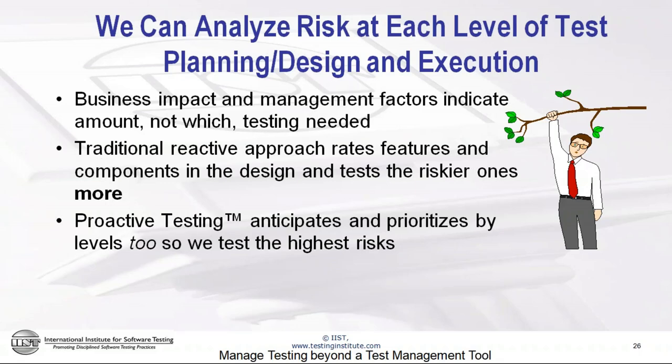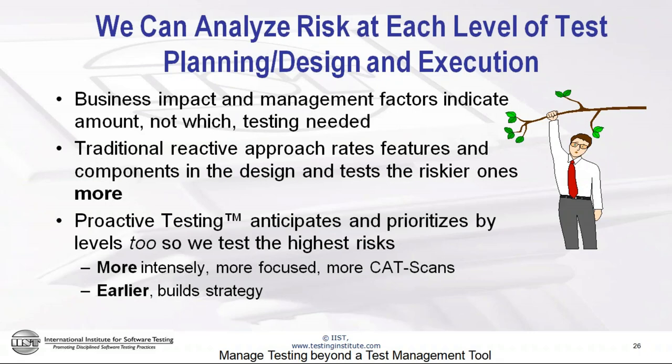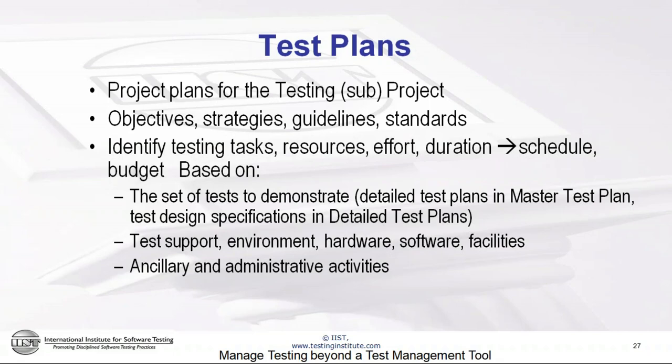When you use an approach I call proactive testing — which we describe much more in the full-day managing the test project seminar — we see how to anticipate, prioritize, and do this very economically, so that we test the highest risks not only more but also earlier. The advantage of testing the higher risks earlier is that we can catch those bigger risks when they're easier to fix, and we end up with a much better result.